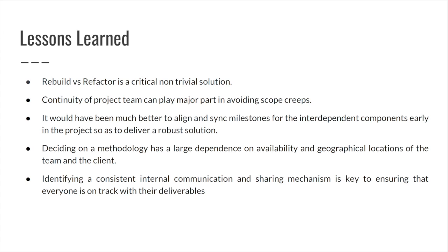What I mean by that is that I think the app team and ourselves could have aligned joint milestones, which would have required us to work together to achieve those milestones. The fact that we had independent milestones meant that we did not really have to test integration between the components till the very end. Another big lesson that we learned was that deciding on a methodology